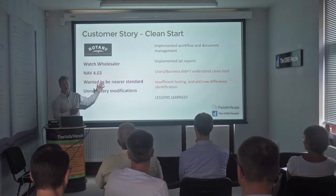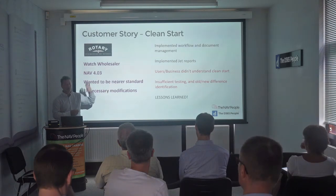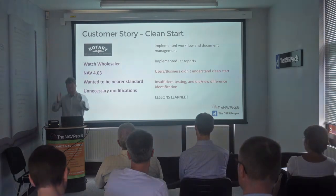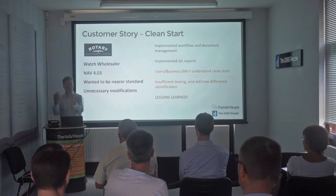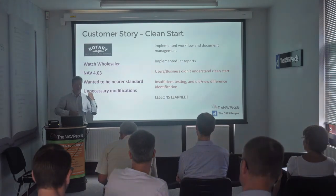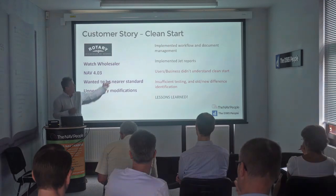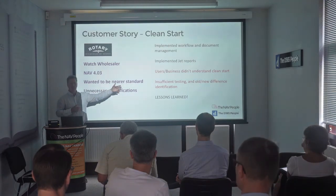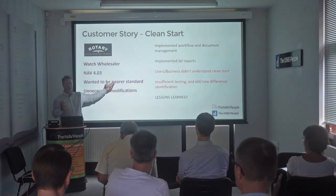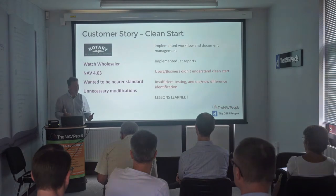So if you're going to do a clean start, it's very important that the user community understand that what you're getting is what you are seeing. In the UAT process, in the training process, that is what you're getting. Don't think in the back of your head, I can't see the so-and-so field, but I'm sure they'll be bringing that on, it's an upgrade. And that's what they had here. Every time somebody would say, well, where's the report for so-and-so? You say, look, that's never been there on this new system. And they'd say, I just presumed as it was an upgrade, I presumed that would be there.